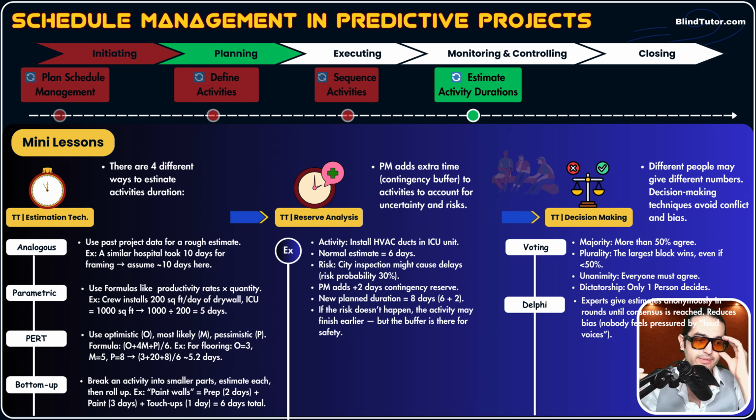And then in the next round, the expert who said that activity would take 3 days changes to, for example, 5 days. But the other one who said 7 days reduces to 6 days, okay? Again, we continue, we analyze, add some reasoning and facts and distribute. Again, we do it until we reach consensus. Everybody needs to agree and align, but anonymously.